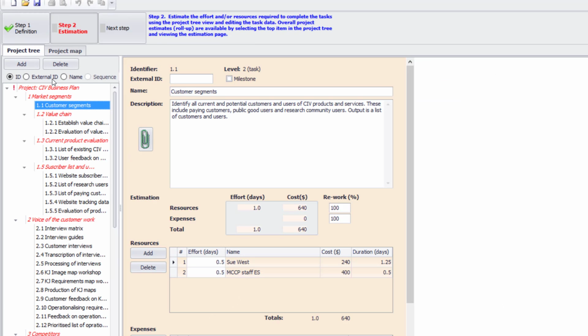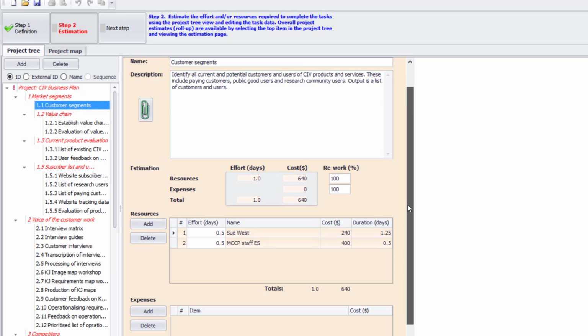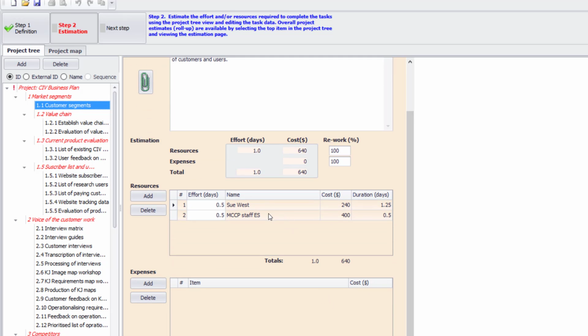You can see here for this particular activity within a project plan, I've fully given it a description of what's taking place. I've actually said in terms of resources it's going to take one person to perform that task, and I've looked at some of the costs in addition to people's time which will be involved in developing that particular activity.